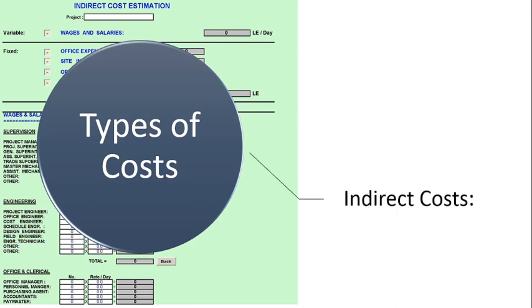Indirect costs. Indirect costs are costs that are shared and allocated among several or all projects. Examples include marginal benefits and taxes. The salary of an architect or a project manager who is partially allocated across many projects. Their team members' salaries would be direct costs since each of them is directly working on a particular project and their salary is a direct cost to the project.